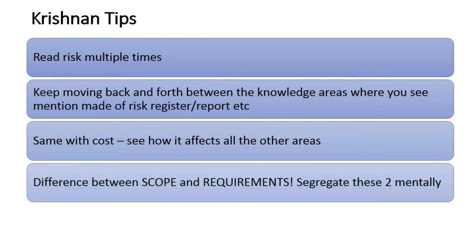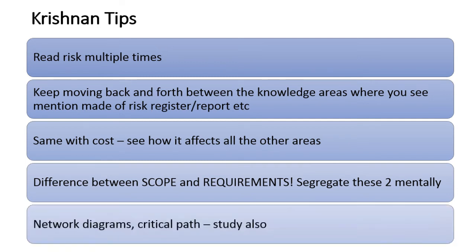You also need to know the difference between scope and requirements. When you talk about collect requirements, that is the very foundation that scope is built on. Requirements need to first be defined before you fully understand the scope. You need to segregate this mentally.